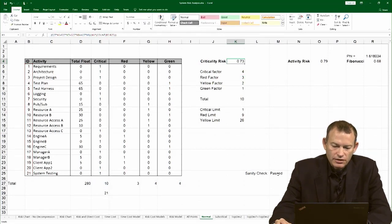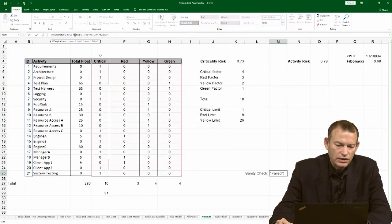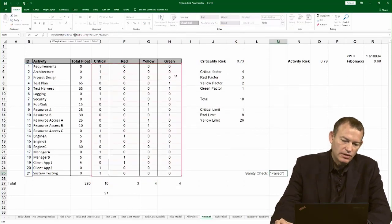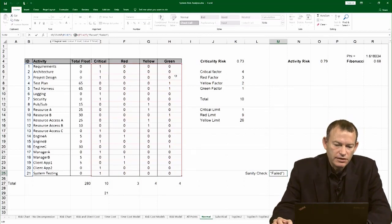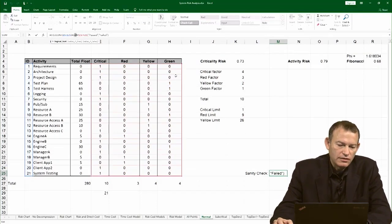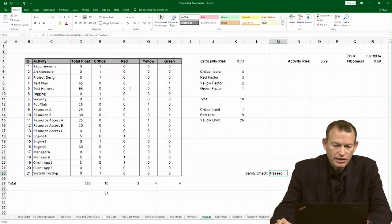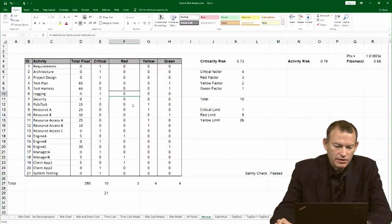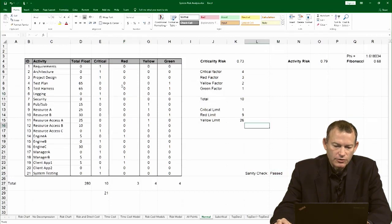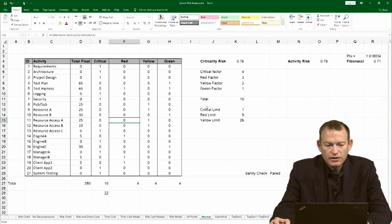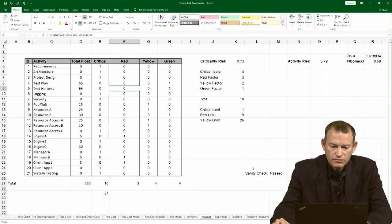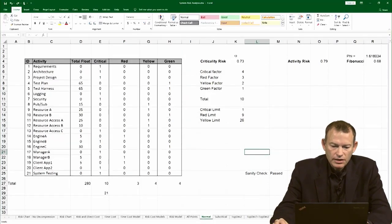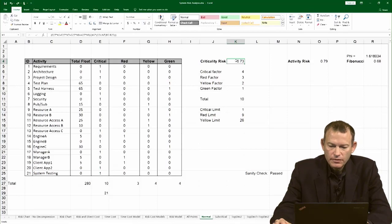There's also a sanity check here. The sanity check simply makes sure that the sum of all classifications - the sum of the green, yellow, red, and critical - equals the sum of activities in the project. It's a very simple sanity check. If I were to go and by mistake type one over here, watch what happens to the sanity check. You can see the sanity check failed because I have a mistake here. And that's the criticality calculation.